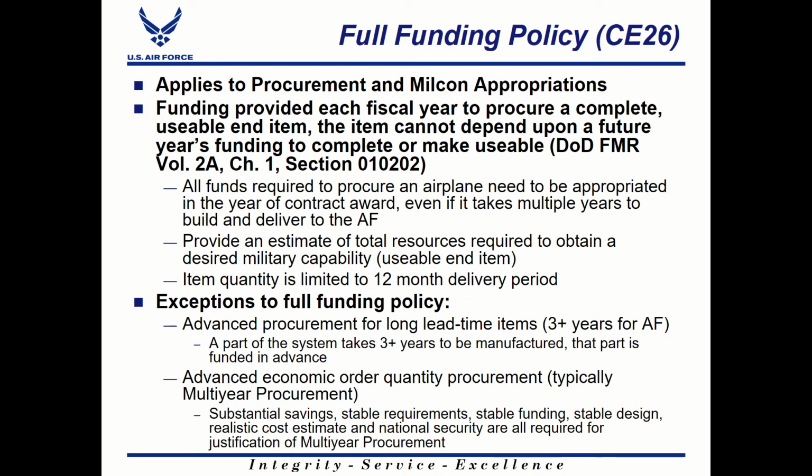The other thing I wanted to cover here is these exceptions to full funding policies. Just as with every policy in the government, there are always rules about when it can and can't be applied, or should and shouldn't be applied. In this case, there are ways to get an exemption from this full funding policy. You have a system that has an exceedingly long lead time. If there's a component of your system that takes more than 3 years to make, you could petition to get advanced procurement for long lead items permission, which will give you permission to not abide by full funding.